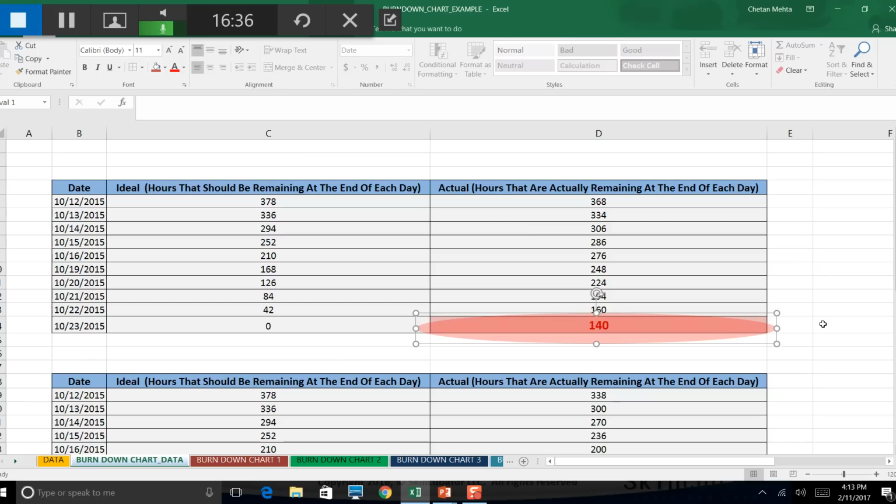Now, you all know that sprint is time boxed. You cannot extend the day just because you have some work remaining. So what will happen is, the user story which you could not finish will go back into the backlog, and it's not going to look good, especially for the product owner as well as the team itself, because you were not able to meet the scope of the sprint.